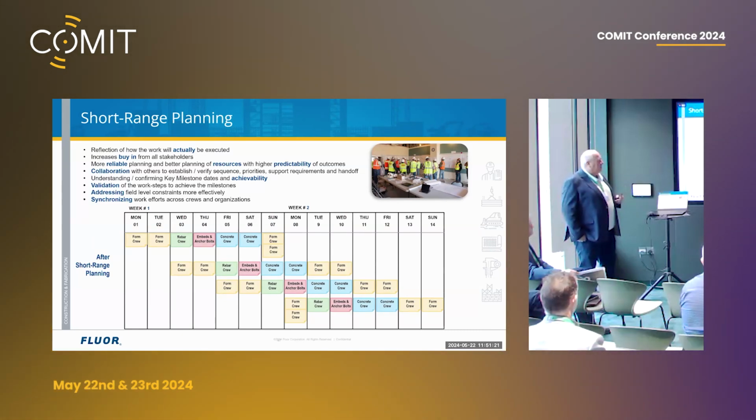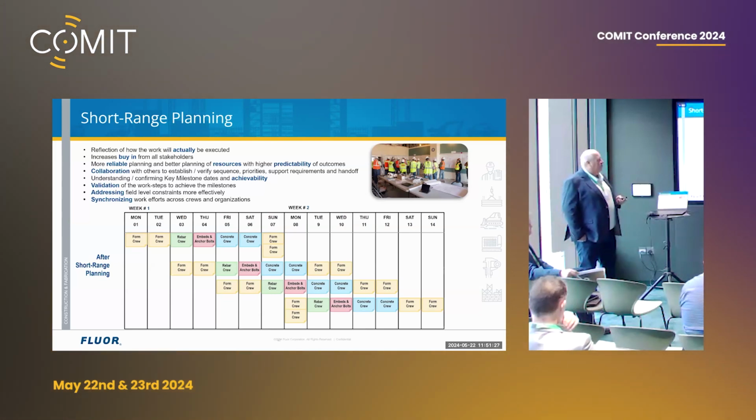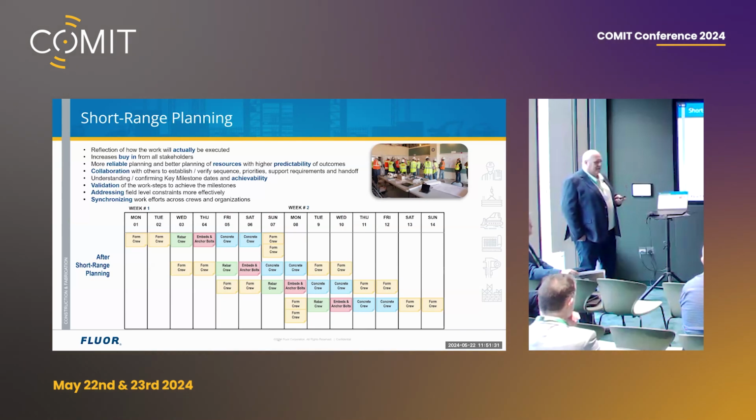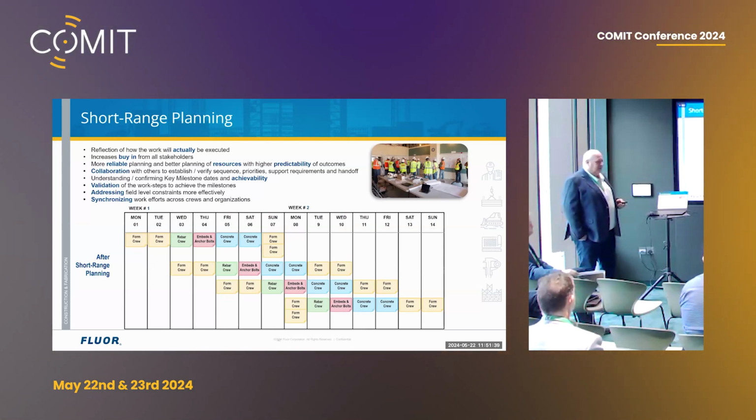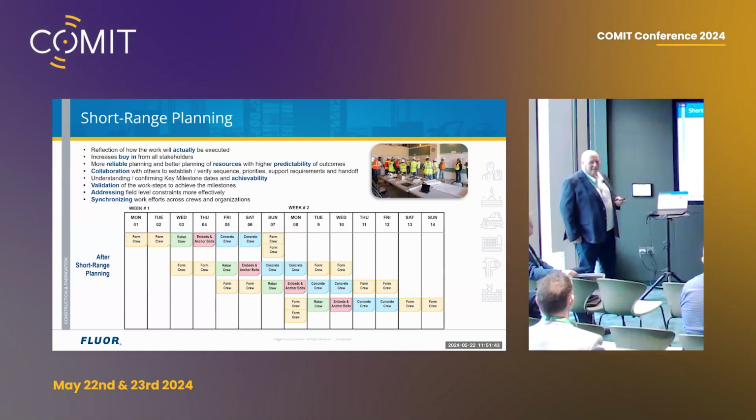And it helps synchronise the crews, what they're doing. Because we don't want people standing around. So before, you might have had the form crew sitting there on Monday and Tuesday. The following week, come back on another Monday, Tuesday. What are they doing the rest of the week? Where now, we're actually keeping them busy. They want to be busy, they don't want to stand around. If they stand around, something else will happen. Their mind won't be on the job. So that becomes unsafe.